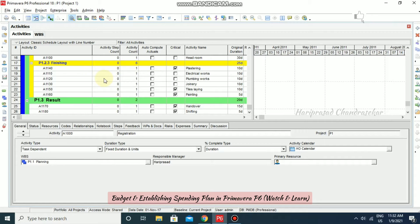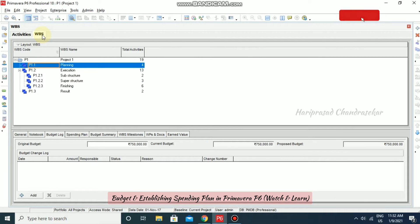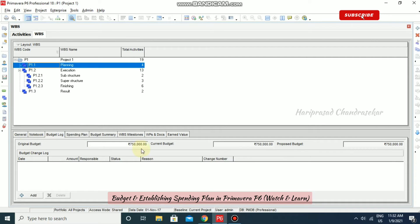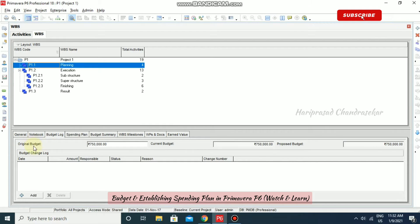This project I have already set up. Now we will see how to add our budgets. Go to WBS — in WBS you can create budget estimates for each EPS node, project, or WBS level. We can create and refine these whenever needed. Go to WBS, then Budget Log, and in Original Budget you can input the value. For this Planning process, I am inputting 7 lakhs 50,000.